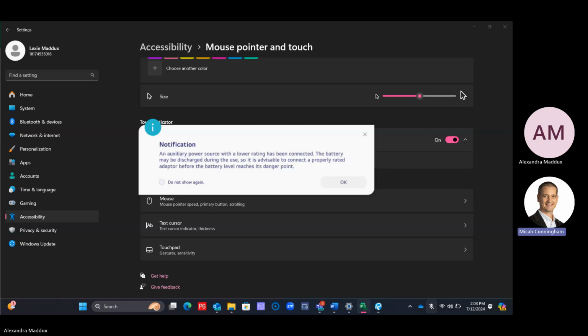Any other questions on this grade work section and everything we did here? Okay, the only other thing I'll mention with the logic: right now, we have the form slab as a start to start +1 with the rebar slab. This is called an open finish. Has anyone heard of an open finish before? It's okay, most people probably haven't. Do you see how there's no logic tie? There is a successor on form slab, but there's nothing coming off of it on the relationship lines. So that's called an open finish.